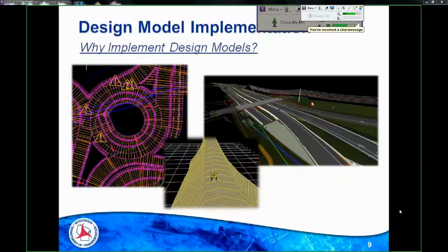If you have a problem, in our world, the earlier you solve that problem, the earlier you address that issue, the cheaper it's going to be to deal with it, right? You solve an issue in early design, it's going to be cheaper than solving that same issue in final design because of the rework associated with it, right? You solve an issue in final design, it'll be cheaper than solving that same issue in construction. You solve that issue in construction, it's going to be cheaper than solving it in operations. That's just the way things work.